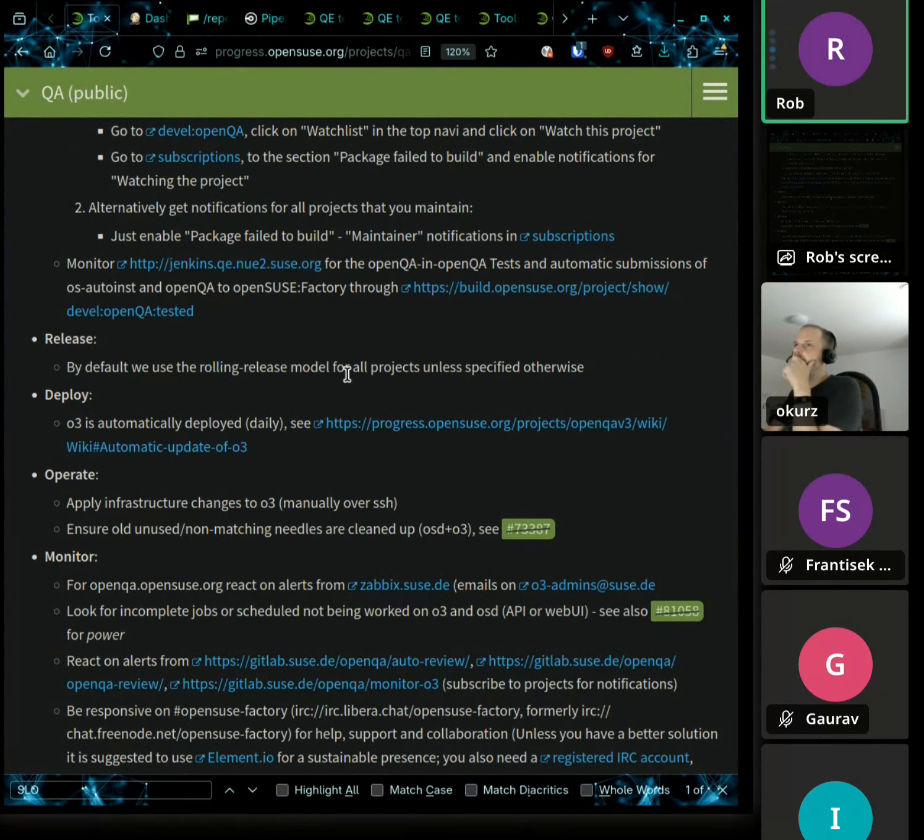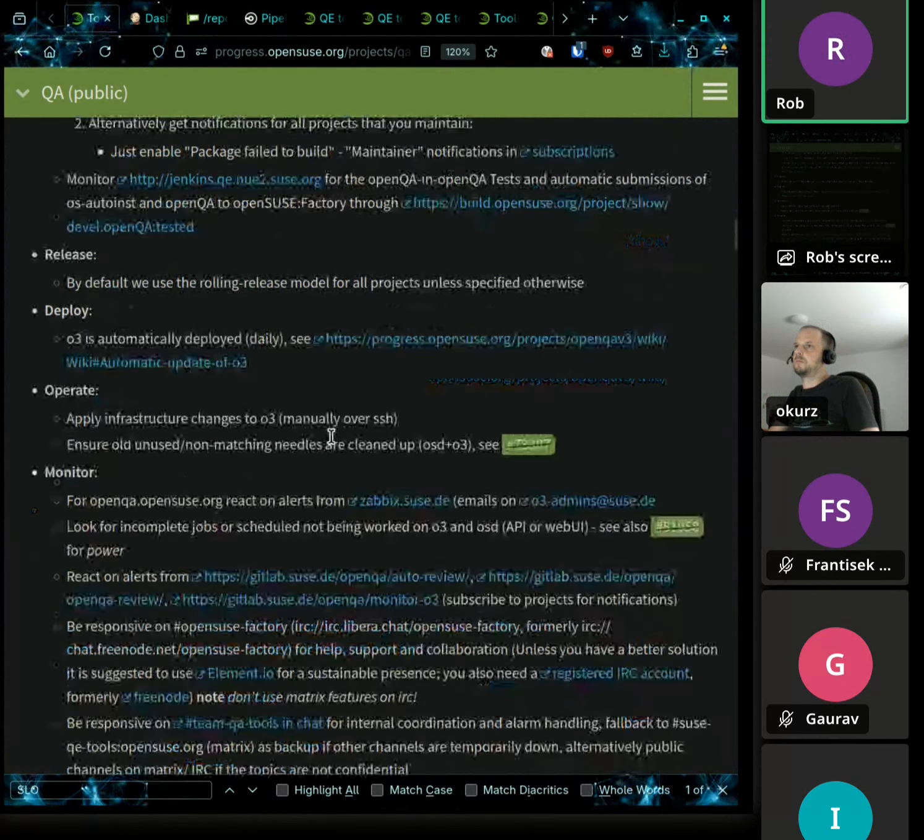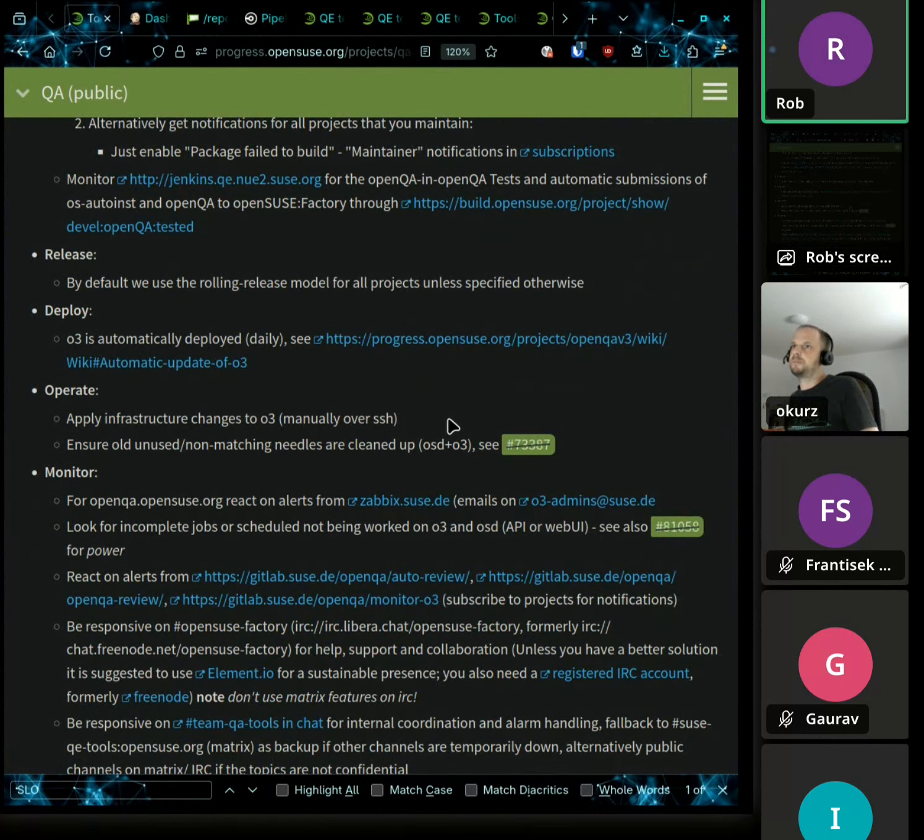For example, our backlog is not defined to be completely done in 1 or 2 weeks, but rather dynamically grows as we work on it. But still, we have review meetings and retrospective meetings every 2 weeks to reflect on how we worked and what we achieved and everything like that. So that we took from the Scrum process.